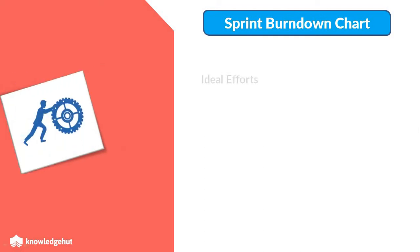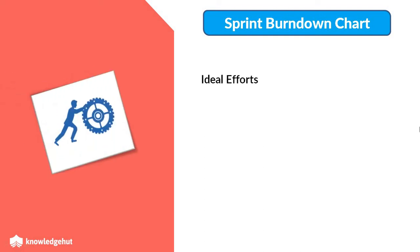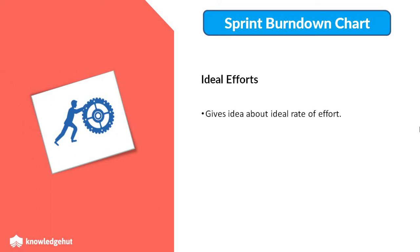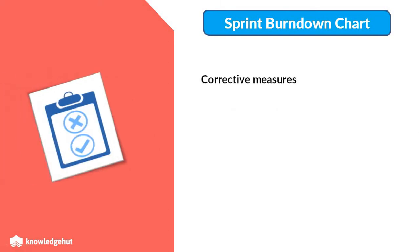Third, Ideal Efforts. The total amount of work to be done and the total amount of time in hand for the complete sprint tells us about the ideal rate of efforts the team should have to complete the work in the given time. Fourth, Corrective Measures. Since the Sprint Burn Down Chart gives real-time data regarding the work progress, it enables us to take corrective measures before it is too late.